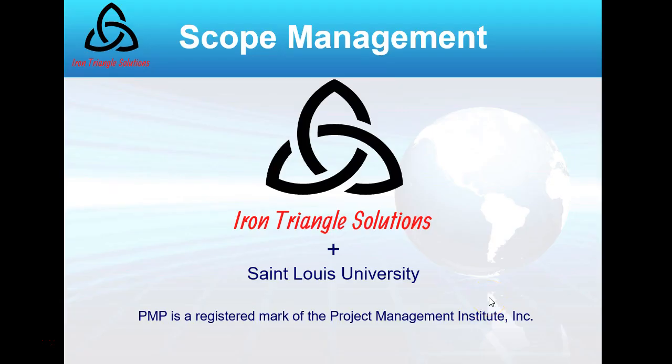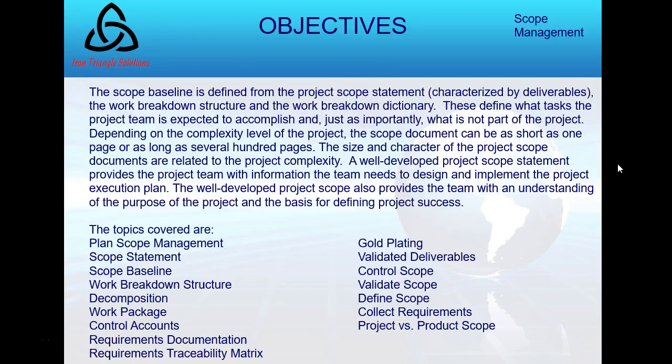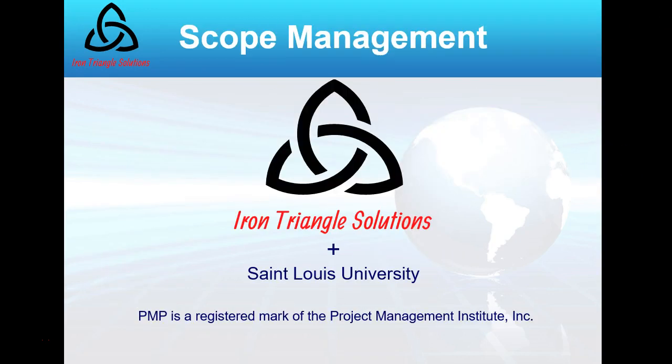Okay, welcome back to PMGT 4030, the Project Management Laboratory. We'll do a series of 6 short lectures to get through a good understanding of scope management. The thing about scope is that it includes all the work and only the work. That very statement by itself is going to help us avoid scope changing in an uncontrolled fashion. All the work, and only the work that is required in the project, which means we'll end up listing what is and what is not in the project.